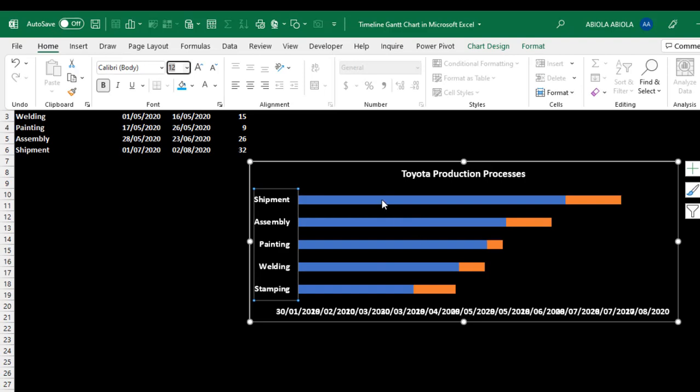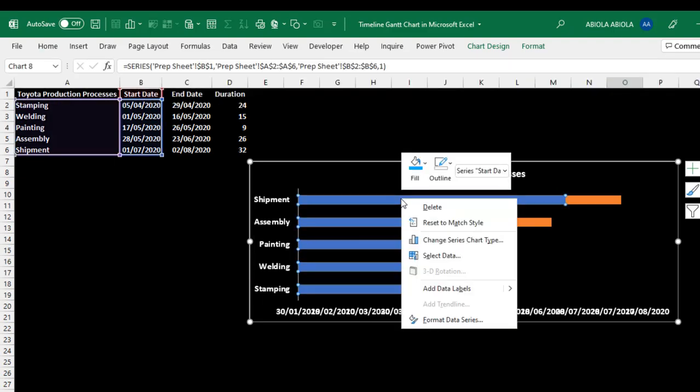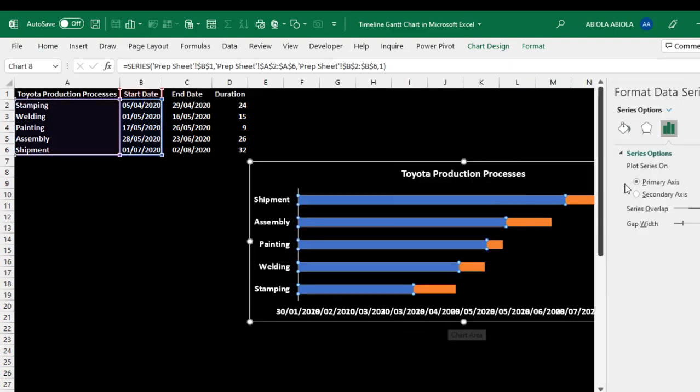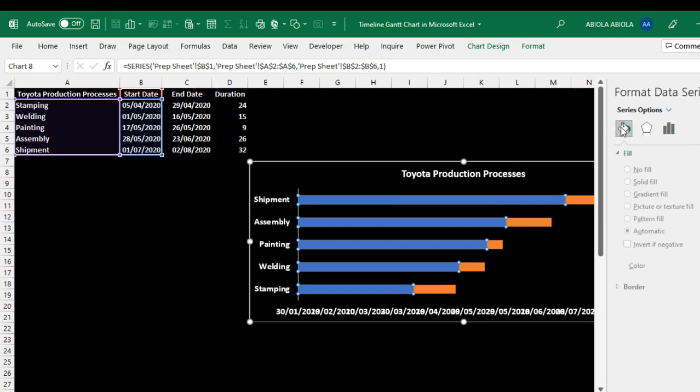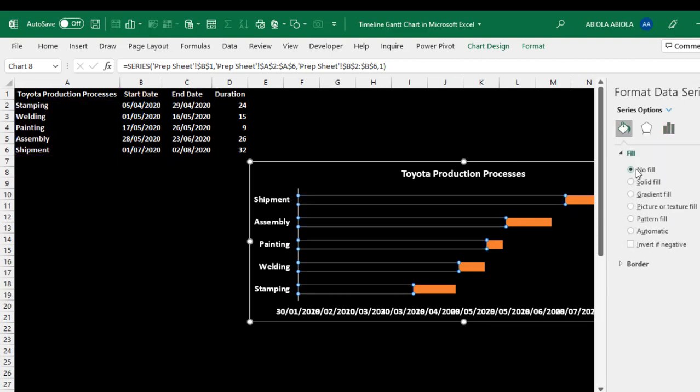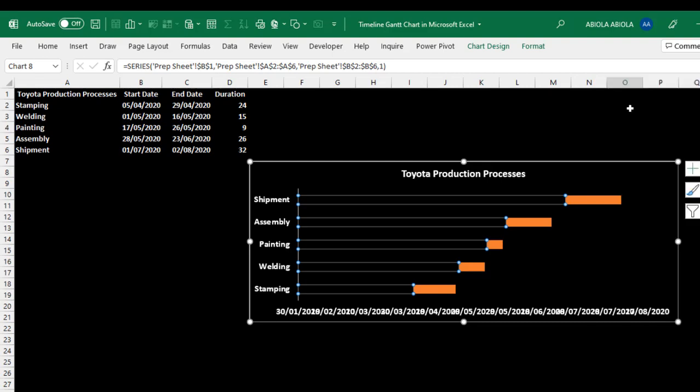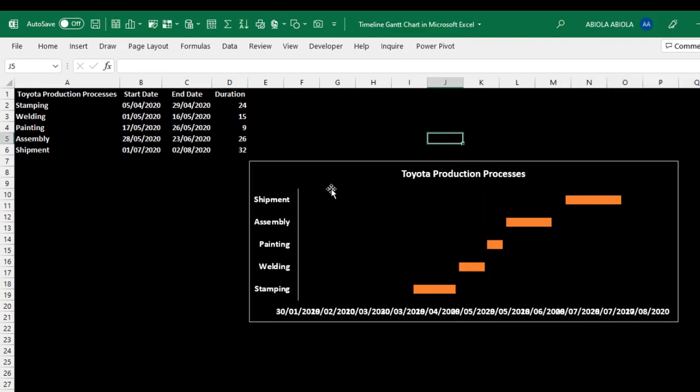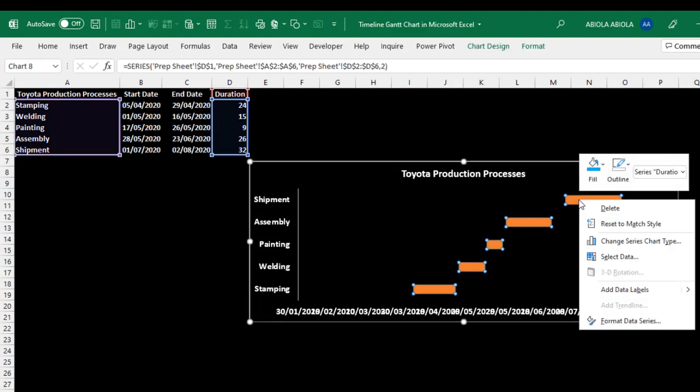I'm going to right click for the Start Date or this our blue bars here. Right click and choose Format Data Series. Click on this Bucket icon. So I want to use No Fill. That's cool. And I'm going to just close this for now. You can actually see that it is gone and our chart is looking nice. So right click. I don't want this color. Let's choose this light blue color. So that's fine.